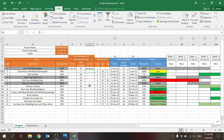Whatever you put in the manual schedule will impact the auto schedule, which we'll get to later. If the manual schedule is empty, that means you usually have some sort of predecessor, which makes sense because in most projects tasks are connected. You may have one or two running in parallel, but most should be connected in some way.